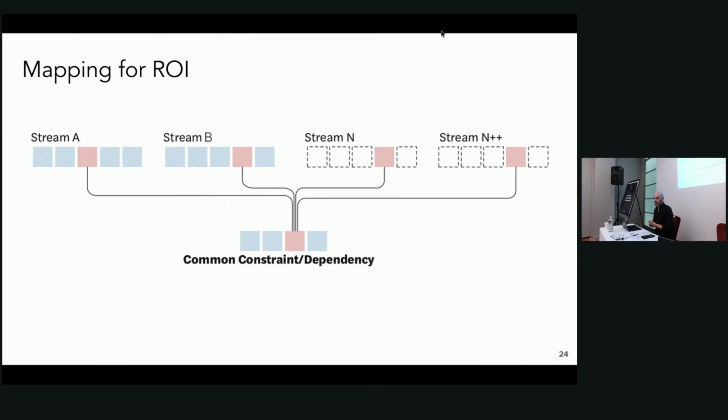Often what will happen is that we map a couple of streams and we find common challenges, and we go tackle the common challenges, and all of a sudden all the streams are improved, right? There's a lot of opportunity for CI/CD pipelines, a big common bottleneck, environment stability and availability, upstream planning and shaping. All these things are very, very common. Testing, manual testing, huge common problem.